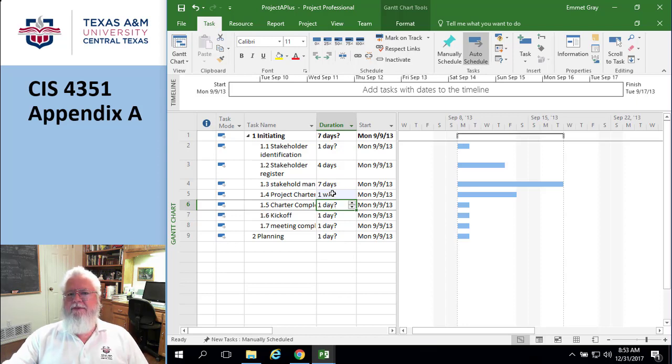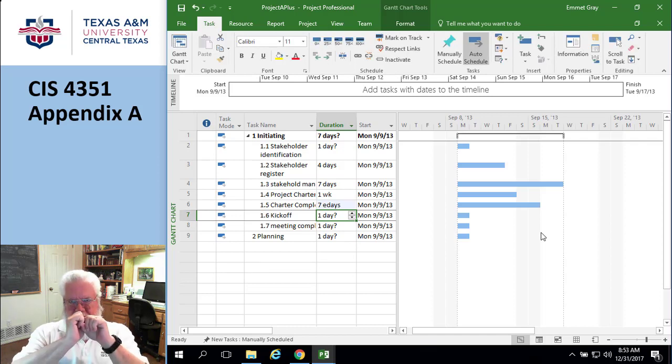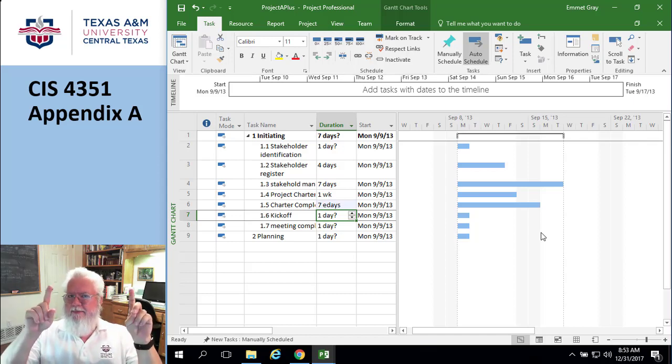Does that sound like a test question to you guys? Okay, good. All right. What if I really wanted 7 honest-to-God real days? In the language here, this is called an elapse day. So if I go here and say 7ED, elapse days, then that means honest-to-God calendar days. They give a dang good example here of when you might want to use elapse day.